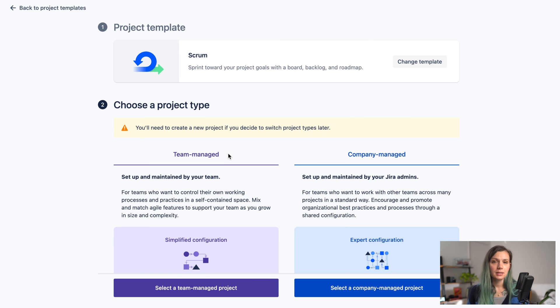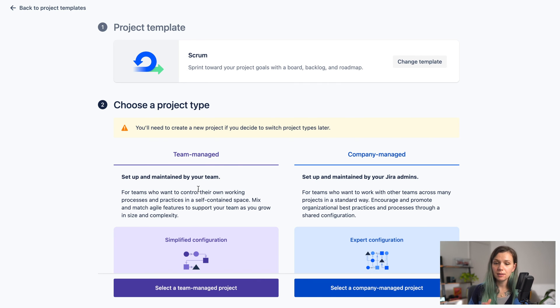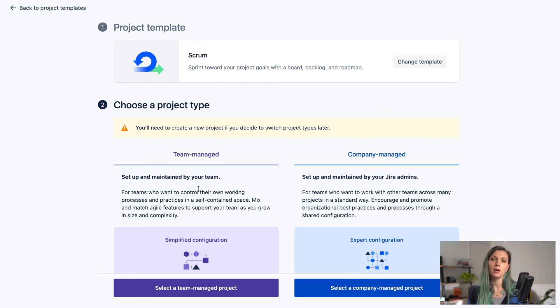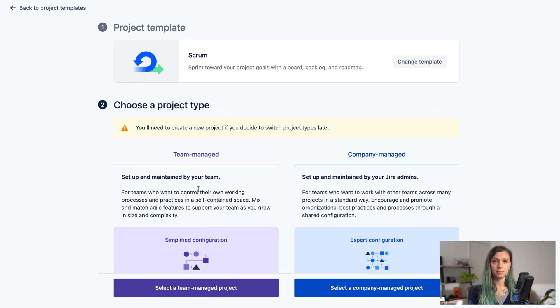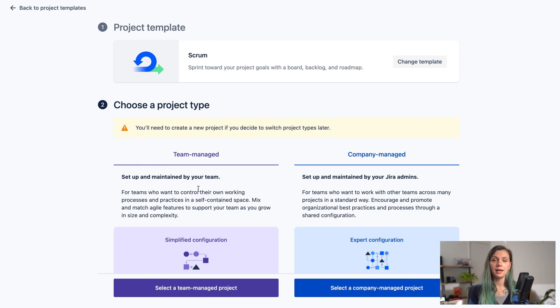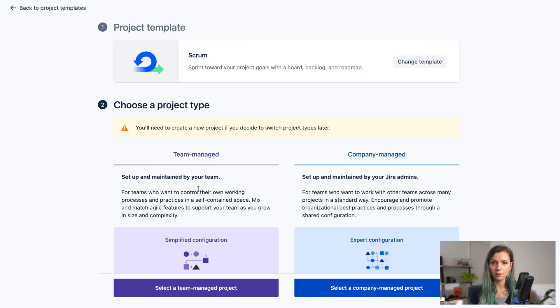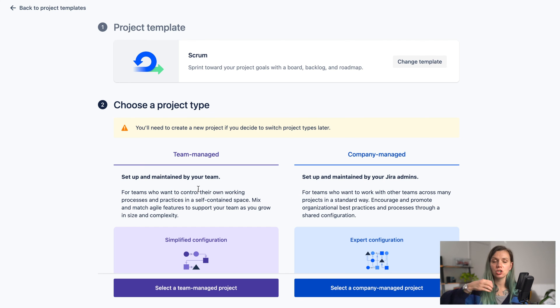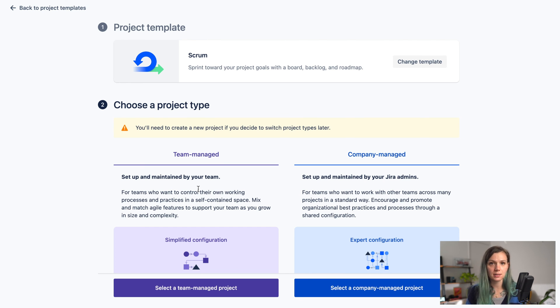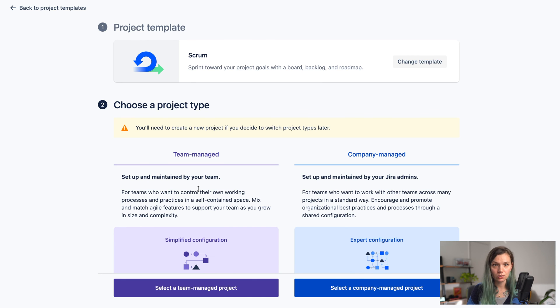Then you're going to be prompted with if you want to create a team managed or company managed project. The difference here is the team managed projects are designed in such a way that the administration is as simple as possible so the team can do it themselves and it's also kind of a more localized setup for that particular project. Company managed projects are great if you want to have a little bit more complicated setup in your Jira project and maybe share some settings across multiple projects as well. This usually also requires a little bit more administration.